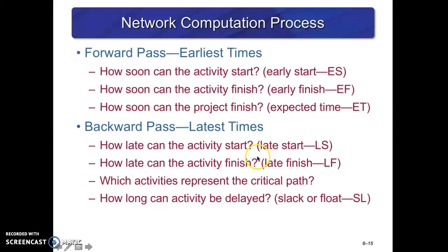You would also be able to answer the question for each task: how much longer can it be delayed without affecting what they call the critical path, the longest project time? Any task on the critical path that is delayed will delay the entire project.